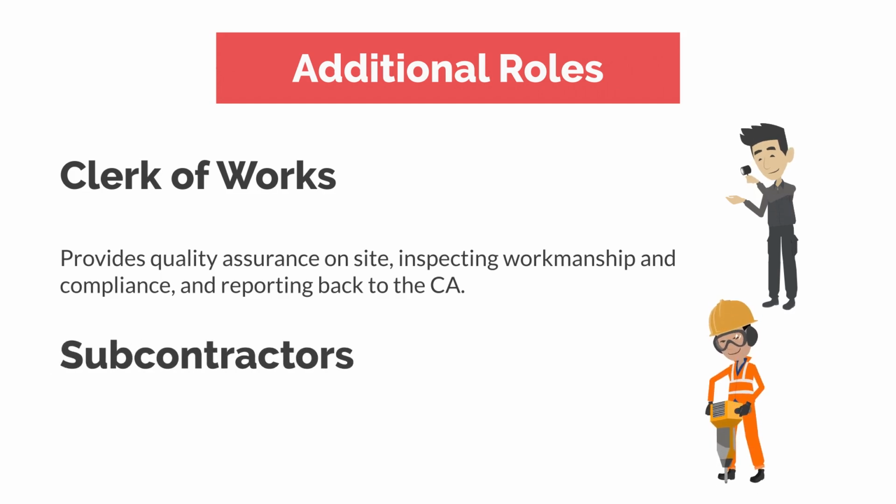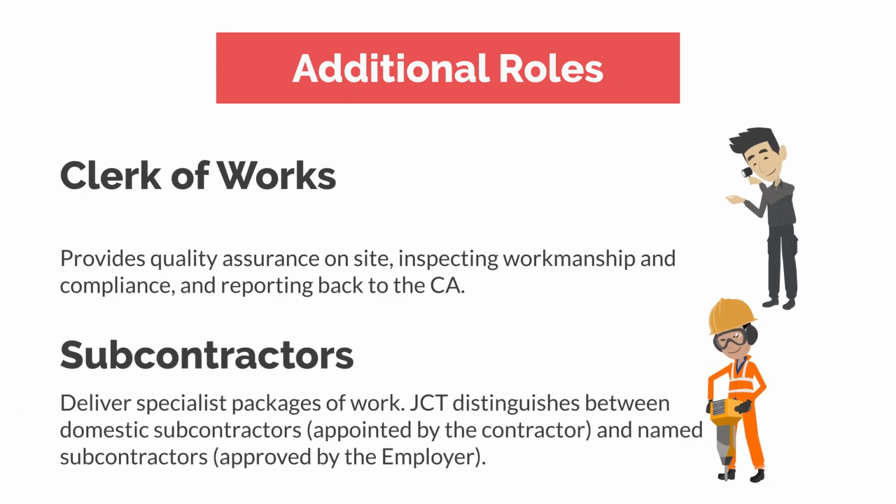Next, we look at the subcontractors. They deliver specialist packages of work. JCT distinguishes between domestic subcontractors, those are the ones appointed by the contractor, and named subcontractors. These are ones approved by the employer. They have different roles and different risk profiles as well. So that will be a course that you may see soon or see in the library already.